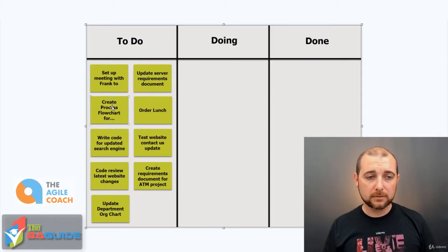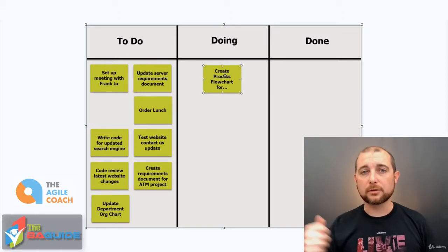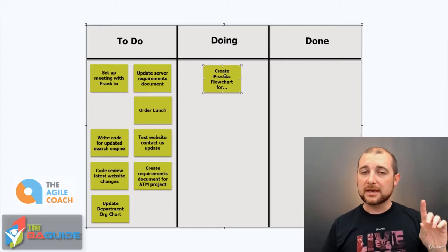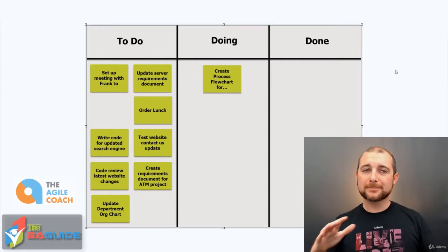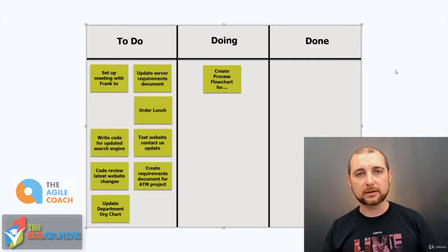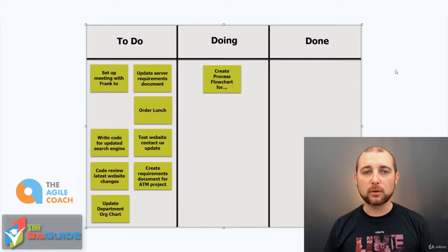On a physical board, I would walk up, grab that sticky note, pull it off, and simply stick it in the doing column. Now that task is assigned to me. With a virtual board, you're going to have all your dates and times and who did it audited automatically, right? It's automatically going to track that, so you can pull that later for some things that we will need.